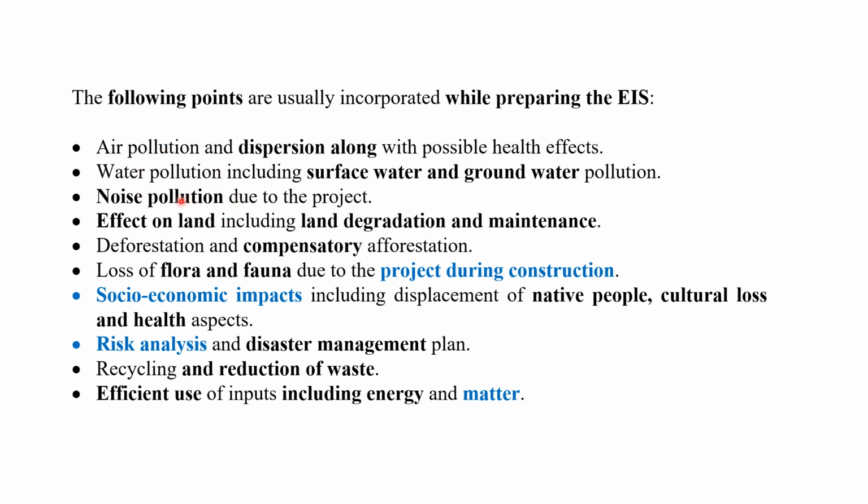whether the proposed development project is going to have any type of air pollution, water pollution, or noise pollution; effects on land, including land degradation and maintenance; deforestation, or whether compulsory afforestation is needed or not; loss of flora and fauna due to the project during construction; socioeconomic impacts, including displacement of native people, cultural loss, and health aspects; risk analysis and disaster management due to the projects; recycling and reduction of the waste; efficient use of input, including energy and matter.